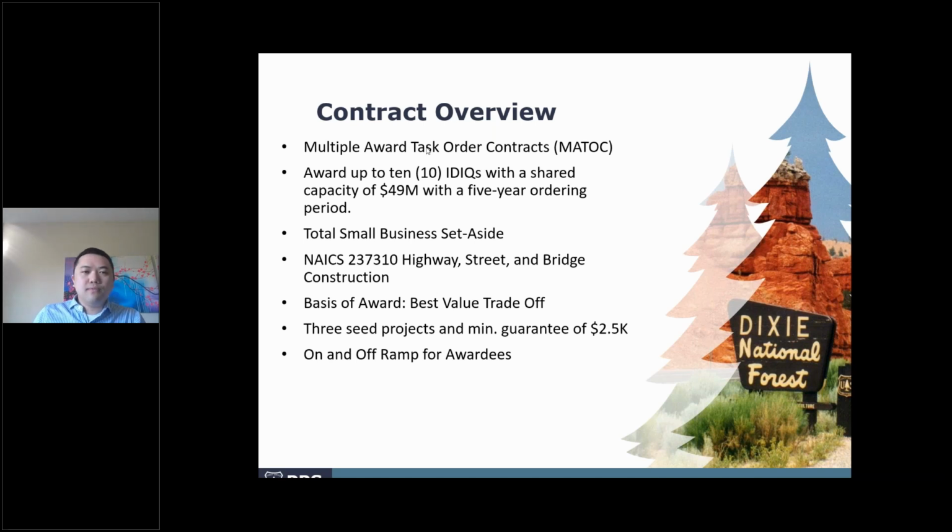And so it's a tool that we use, and within that tool, there's going to be up to 10. So there might be less, depending on how it looks, or maybe more, who knows? But we're looking around 10 IDIQs, and that's just the contract type, right? Okay, so you're looking at the one MATOC. Yeah, the one MATOC for this activity, and we are looking at the potential ceiling of 10 contractors that will hold contracts to bid for the activity for that specific MATOC.